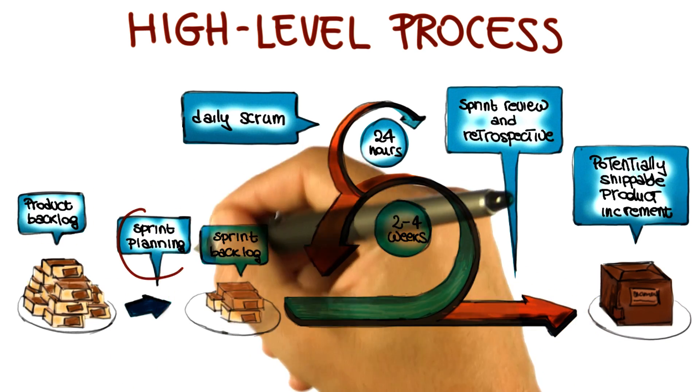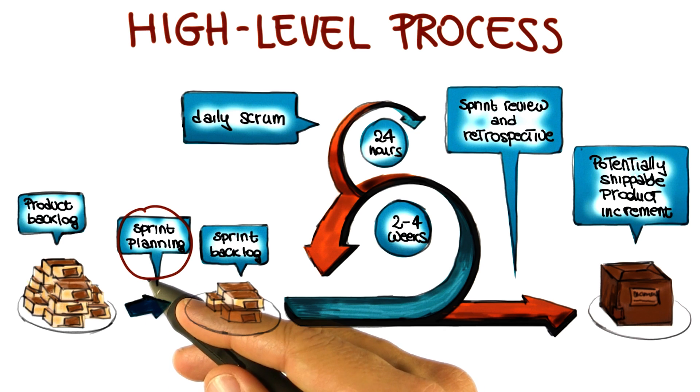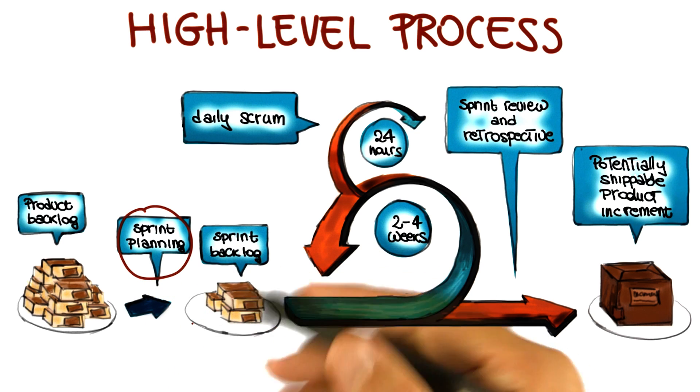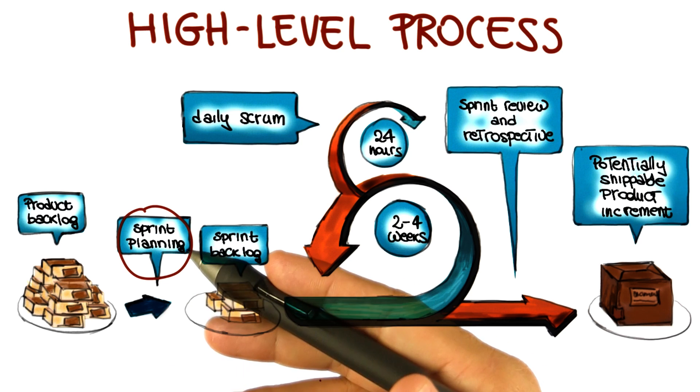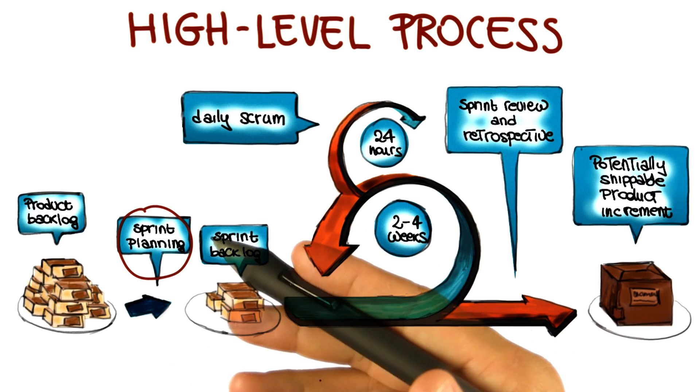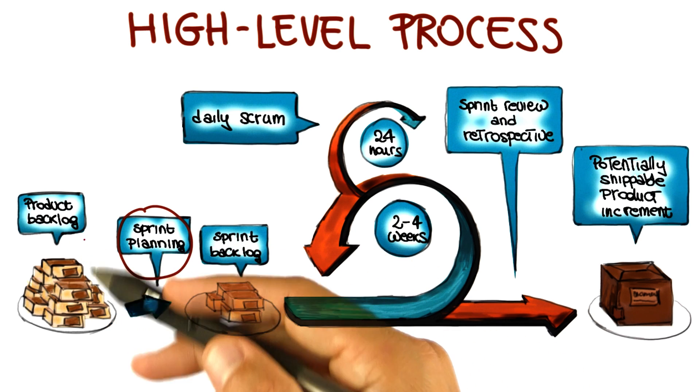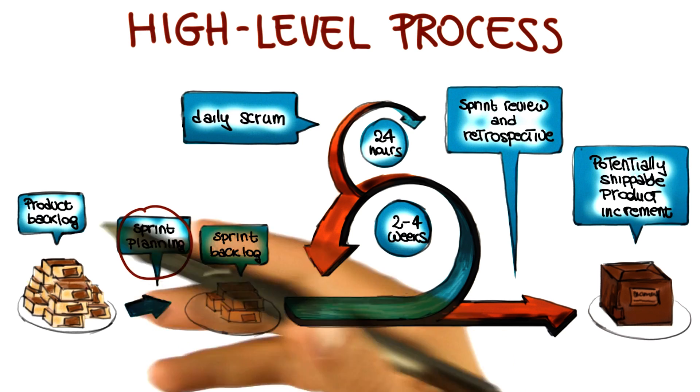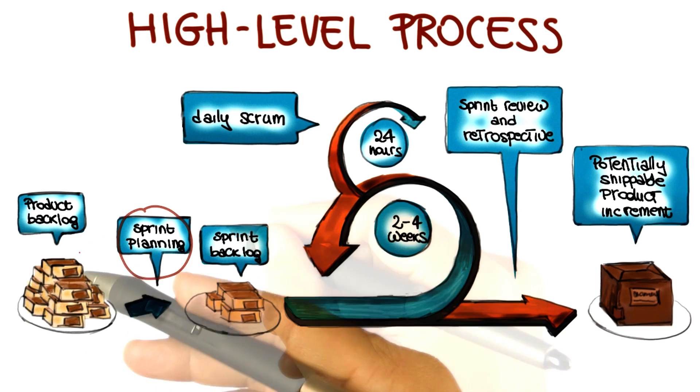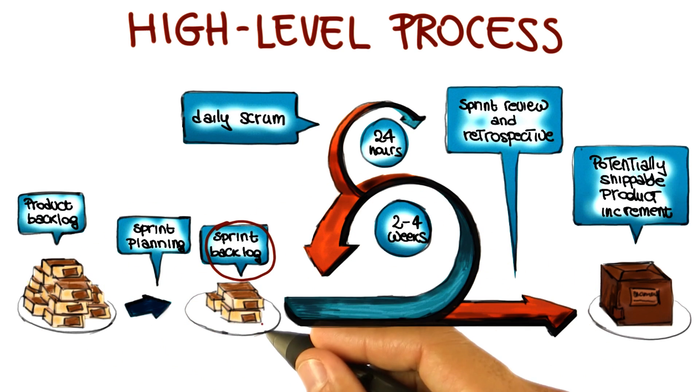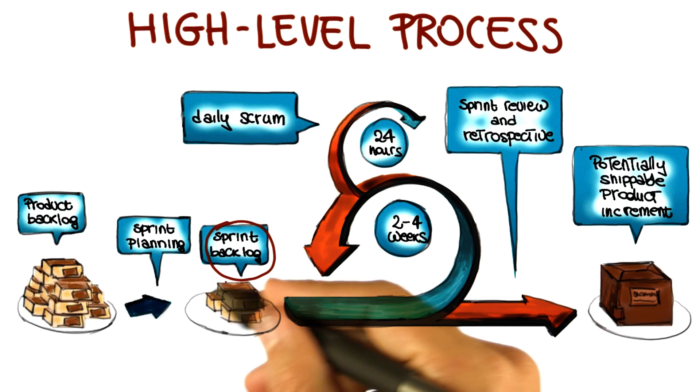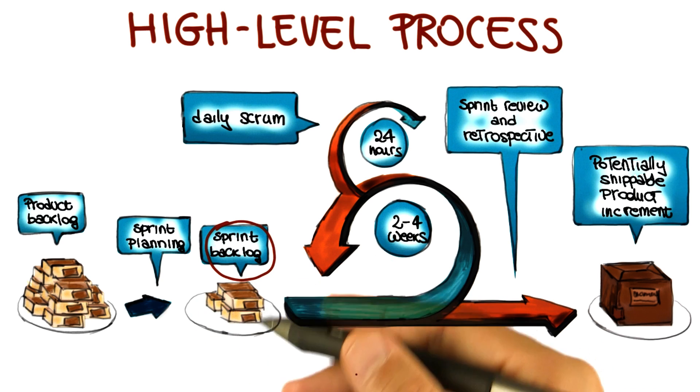In the sprint planning, what happens is that the next increment, or the next sprint, is defined. So basically, the backlog items of interest are selected based on the characteristics we just mentioned: value, risk, priority, and necessity. And the items are converted into tasks and estimated. So the result is the sprint backlog, which is the set of backlog items that will be completed during the next sprint.